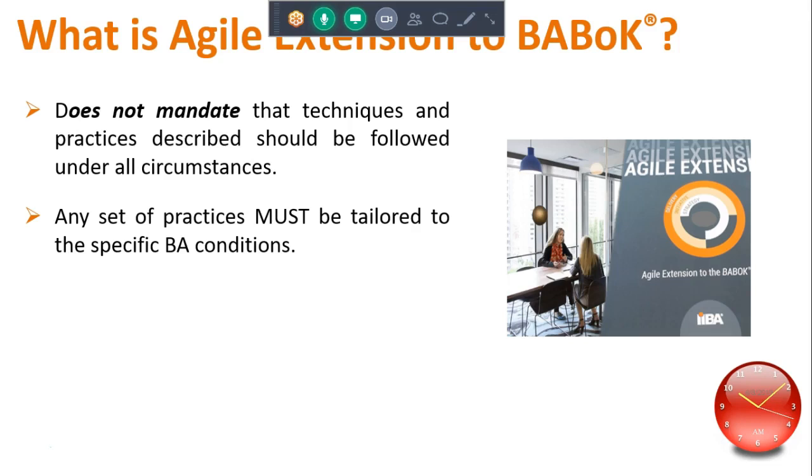If you say that there are a certain number of things that we need to have in place in order to do these things, certain things where we know that requirements are relatively definable and relatively static, then a waterfall methodology works. That can be coupled with a circumstance where other parts of the project may lend themselves much more readily towards the more pure agile ways of doing things. So hybrid makes perfect sense.